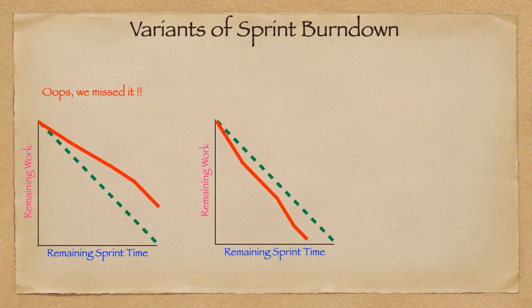So that is how transparency is provided to the development team during the sprint, and they can effectively plan and work the remaining work. In this case, they completed all the items selected a little bit before the sprint time box expires. So they may call the product owner and pull maybe 1 or 2 small items, which they can finish in the remaining time.